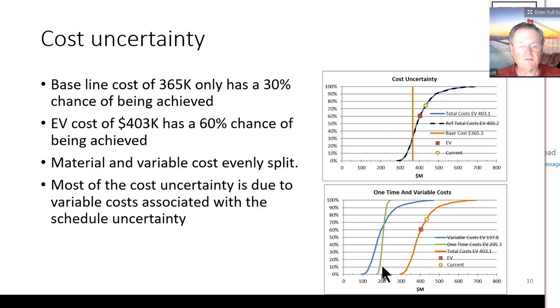In other words, not a lot of uncertainty in the material cost. But when you get to the labor cost, there's quite a bit of uncertainty, because you have uncertainty in the labor cost itself, a P10, 50, 90, and then you've got the uncertainty in the schedule, and those things get to multiply together. So you take 2 variables, multiply them together, what do you get? Something that looks kind of log normalish rather than normal, and that's what you're seeing here.